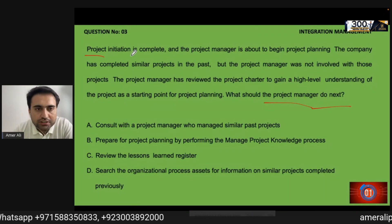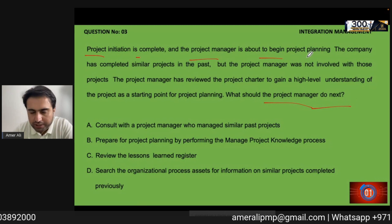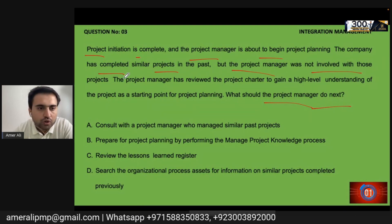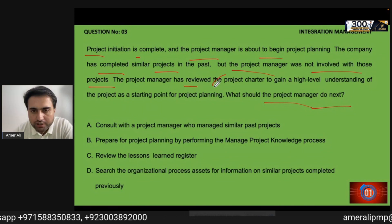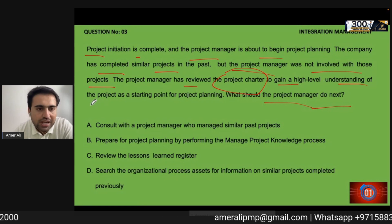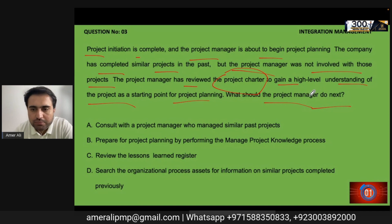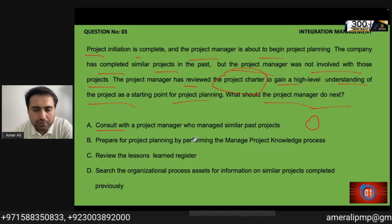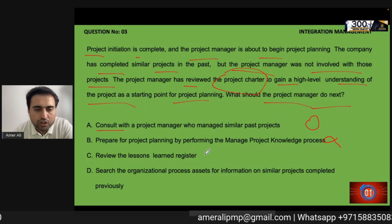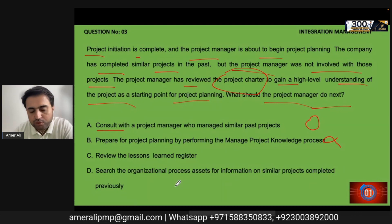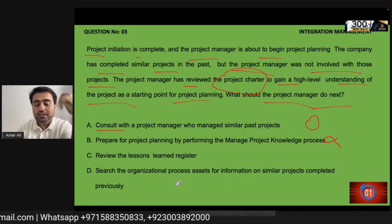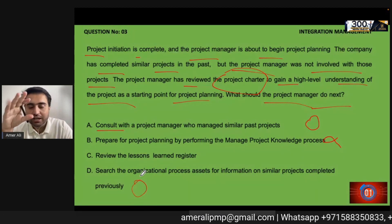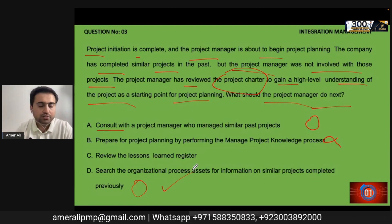Question: Project initiation is complete and the project manager is about to begin project planning. The company has completed similar projects in the past, but the project manager was not involved in those. The project manager has reviewed the project charter as a starting point. What should the project manager do next? The answer is to search the organizational process assets for similar projects. That is the straightforward and correct answer.